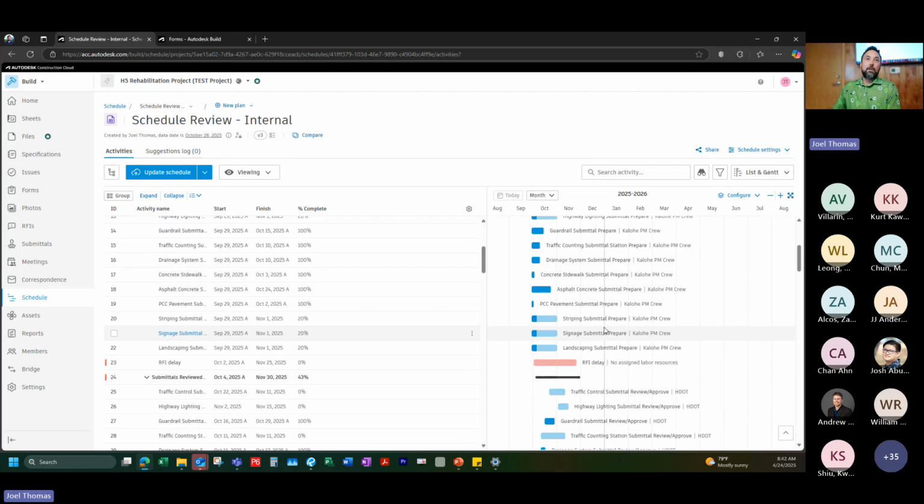Because they could have 2 guys or they could have 20 guys. So understanding the resources applied to that also helps you understand, are they at pace? Are they going slower? Do they need more resources to stay on track? Monitoring the resources as well as the durations helps you work with the contractor. You can say, hey, that's not the way you planned your work. What's going on? Or vice versa. You get a lot of people, it should go quicker. You get fewer people, logically it goes slower.